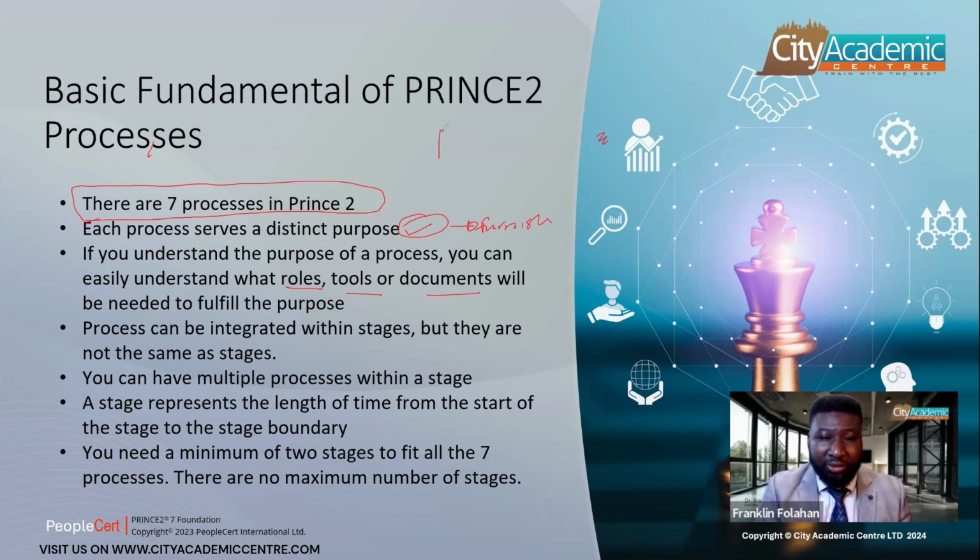Processes can be integrated within a stage, but they're not the same as a stage. We told you earlier on that the stage is the length of time from one point to the other. The processes form their own set of activities within that stage. So that's why within a stage, you can have the initiating a project process as well as managing stage boundaries. So 2 different processes within that stage that serve their own functions. You can have multiple processes within a stage. A stage represents the length of time from the start of the stage to the stage boundary.